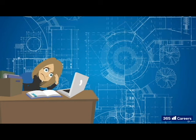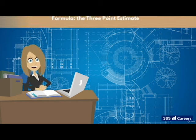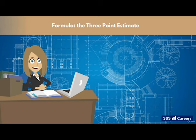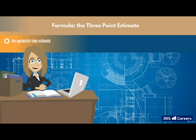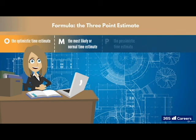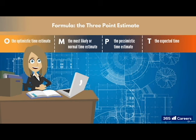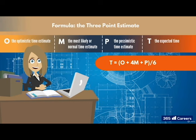Oh, and one last thing. If the project manager is really, really stuck, they can use the following formula. The three-point estimate. But remember, a project manager should rely on their skills and experience first. But if they need to, they can think of each task as having three time estimates. The optimistic time estimate, we'll call O. The most likely or normal time estimate, we'll call M. And the pessimistic time estimate, P. The expected time, T, is estimated by putting the values into the following formula. Plug the numbers in and you get a time estimate.